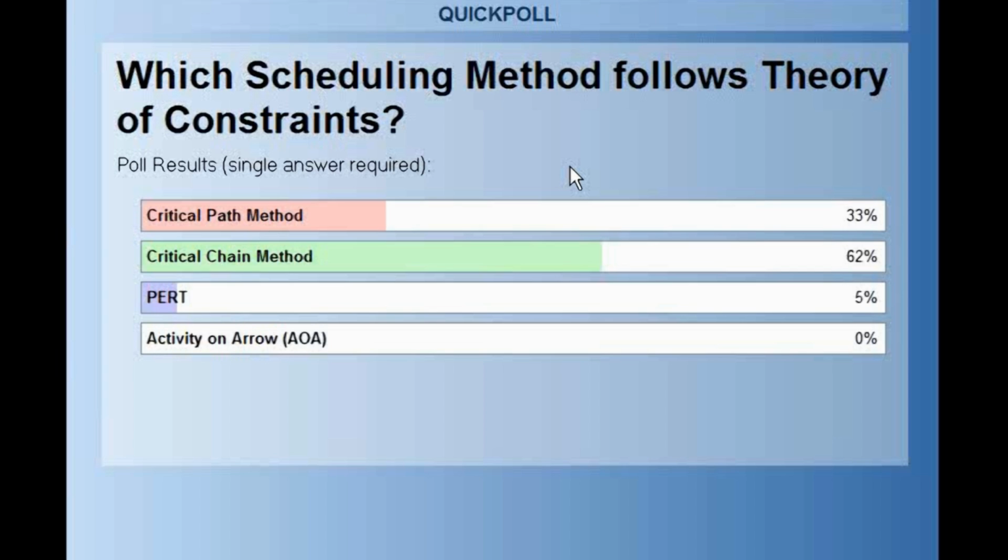Okay, so I got one more question. Can I talk again about the difference between critical path and critical chain? Yes, we can talk. See, the simple idea is in critical path, we are estimating activity duration with predictable, realistic estimates. In case of a critical chain, we are not estimating activities with buffers, we are estimating them aggressively. And we are also putting resource constraints.